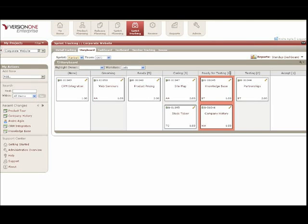This gets you back to your systems thinking — what can you do to make sure you don't go over that limit? There are a lot of different things a team could do. Having that discussion and finding alternatives — that's what the Kanban board is allowing you to do. One real-world application: in my last case, we didn't have enough testers, so we put a very strict limit on test. When test became a bottleneck, we'd have developers go over and see if they could pitch in — writing automated scripts, whatever. That becomes an 'all hands on deck' situation — can we free up or add some resources to eliminate that bottleneck and get things rolling out quicker? That's just a real-world application of a WIP limit.